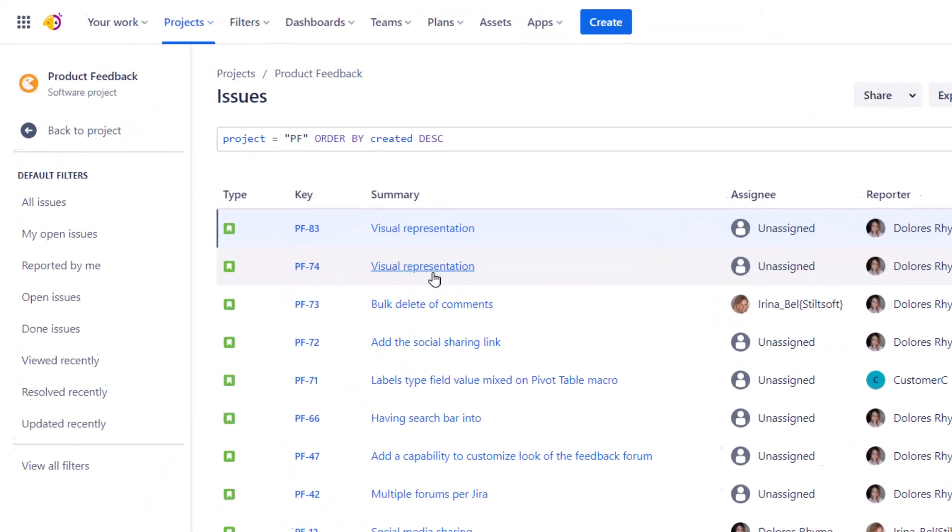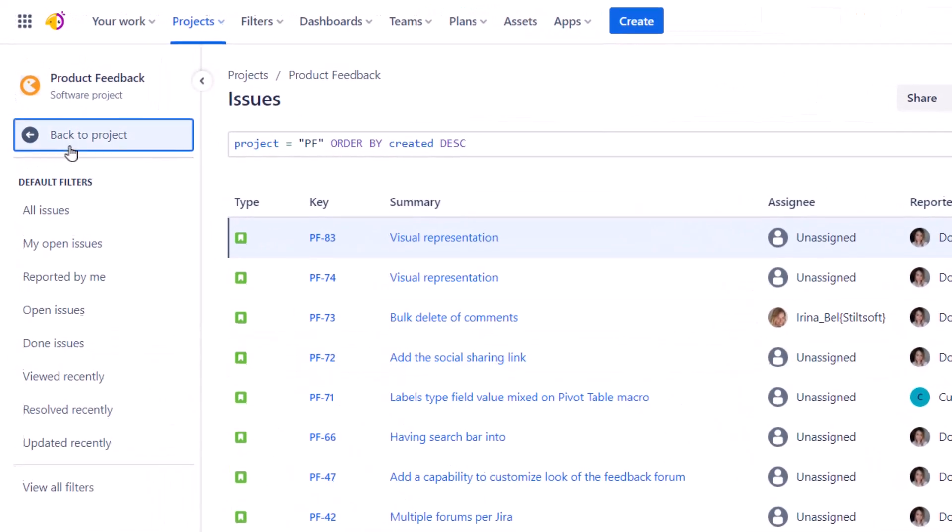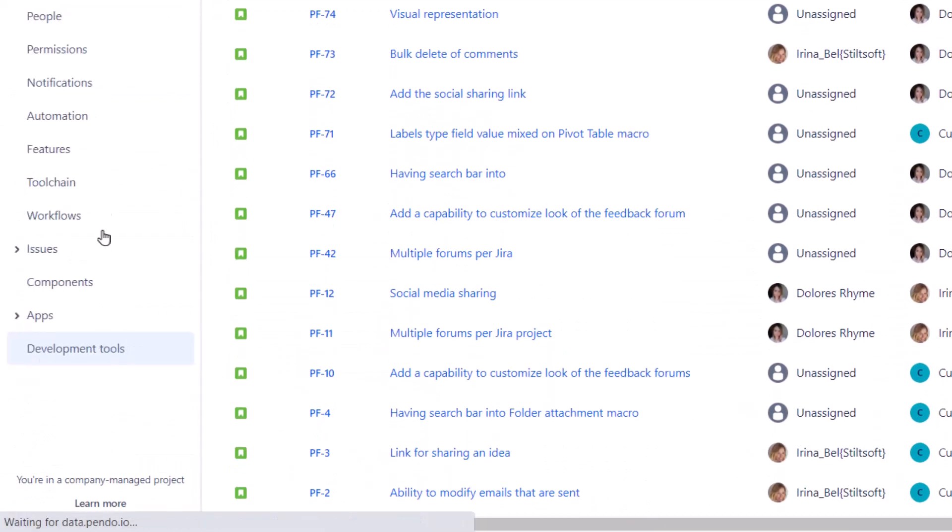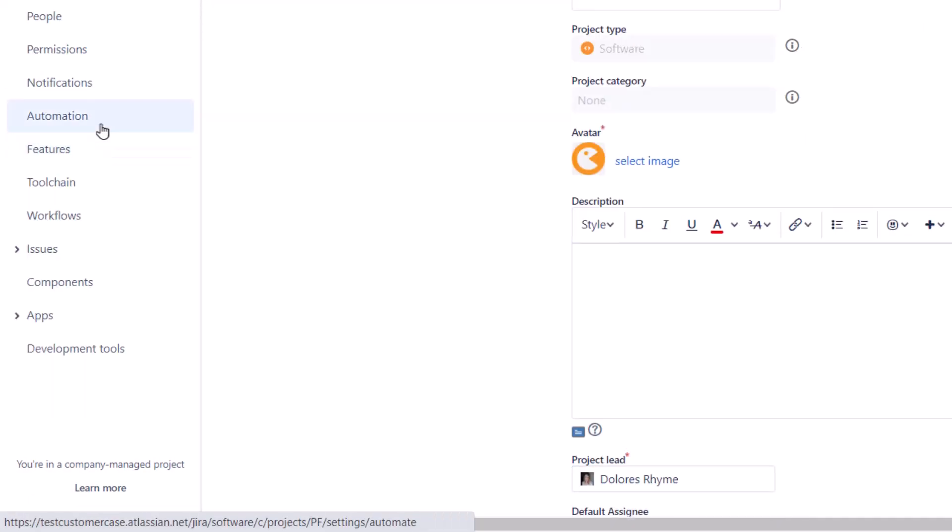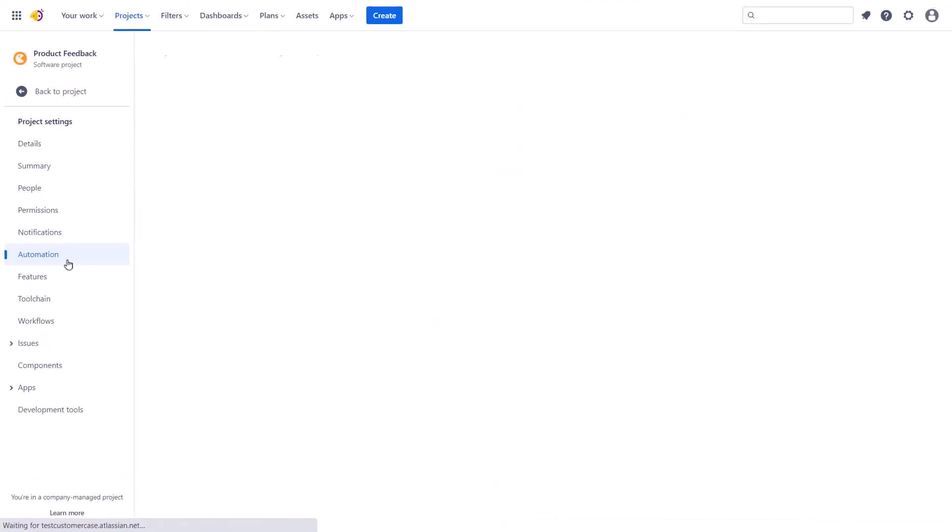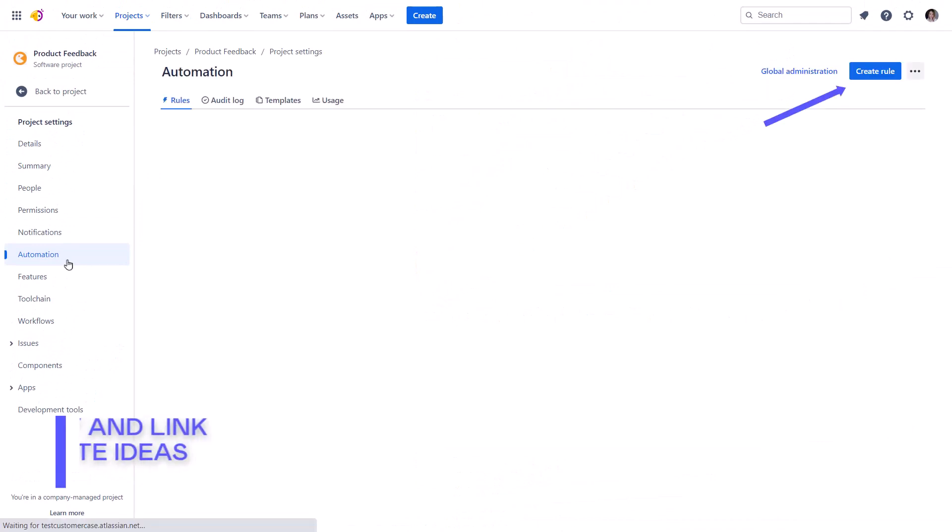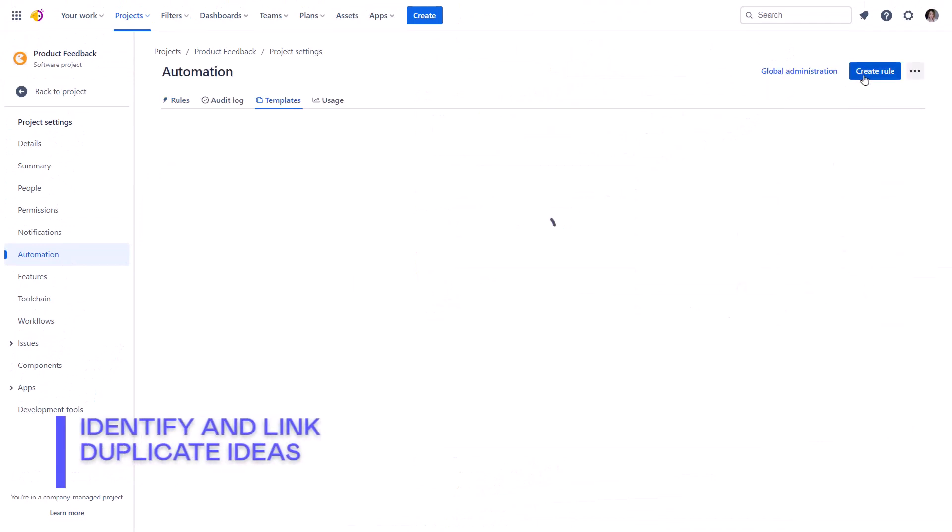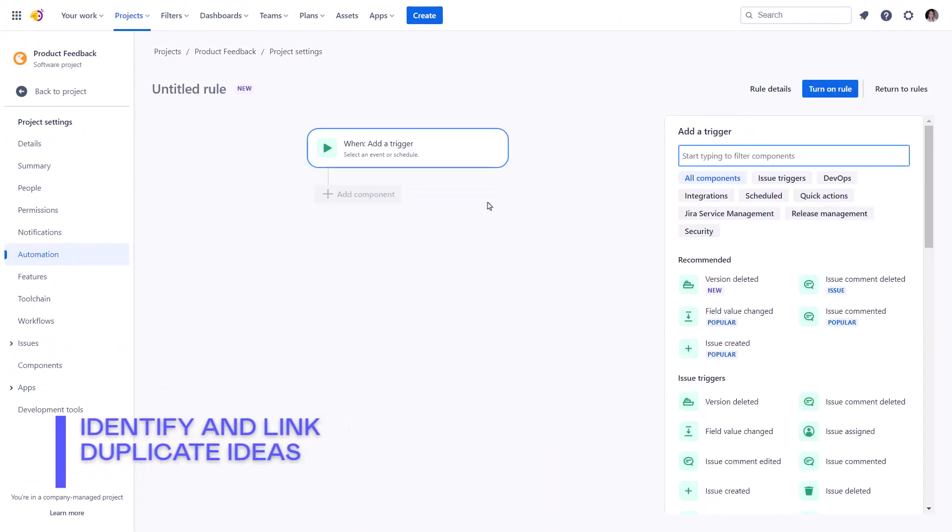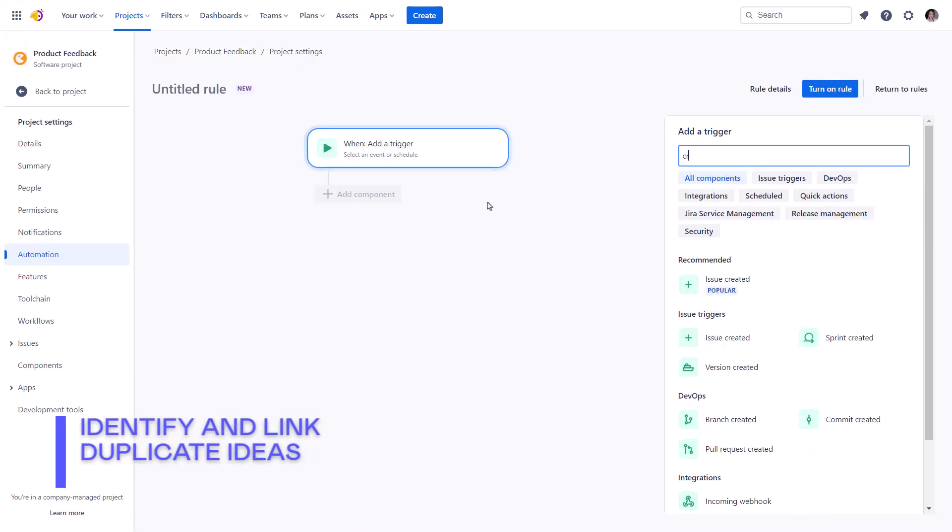When a backlog contains similar ideas, it prevents the product manager from assessing the true feature demand. Here is the rule that identifies and links duplicate ideas.